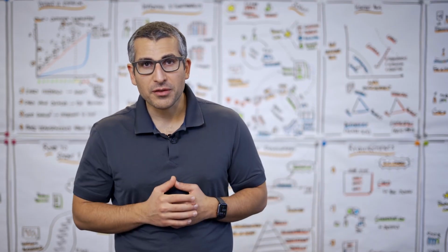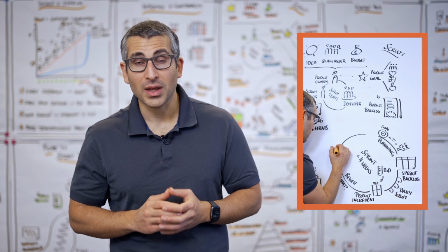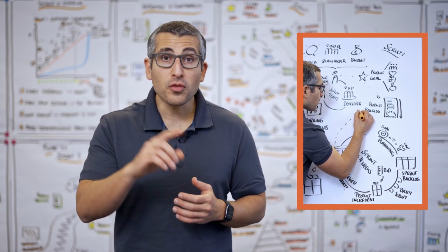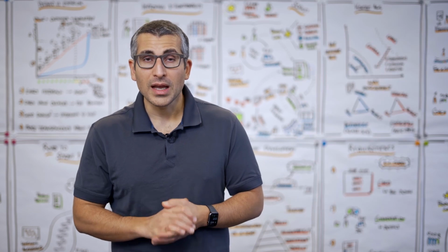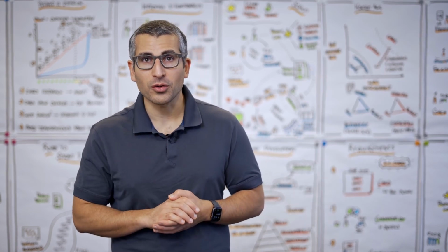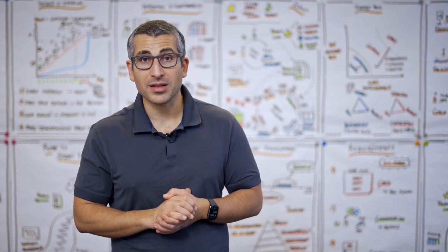The feedback we receive from our stakeholders is usually new product backlog items. And those product backlog items, as the name indicates, move into our product backlog. But it's at the discretion of the product owner, it's the authority of the product owner to decide where he or she wants to prioritize them.